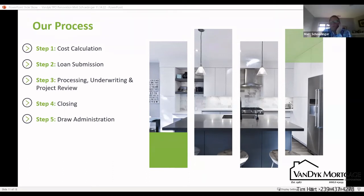Right. So if the roof permit is less than 50% of that value, then you go to the next value. I'm not certain, because this is also new to us too, whether you have to do those sequentially or if you can do them simultaneously. A lot of the ones that I've had where they've had to have multiple permits, you're allowed to apply for all the permits at one time. Mm-hmm. You just have to have your plans and specs for the different items.